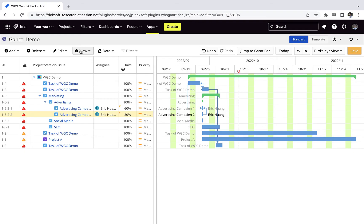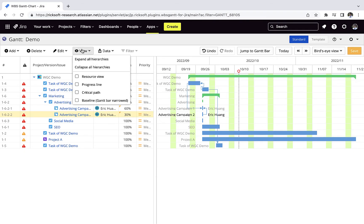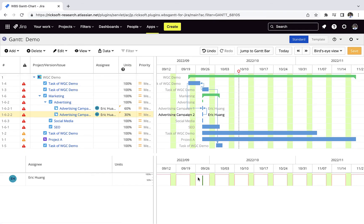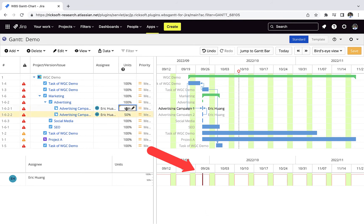In the View option, you can set the Resource View and allocate your resources. Green is within the limit, red is over the limit.